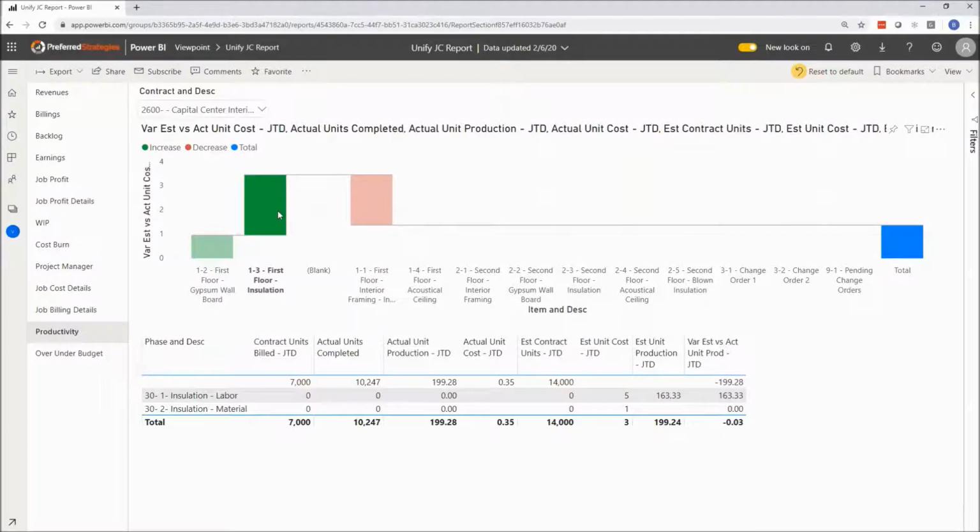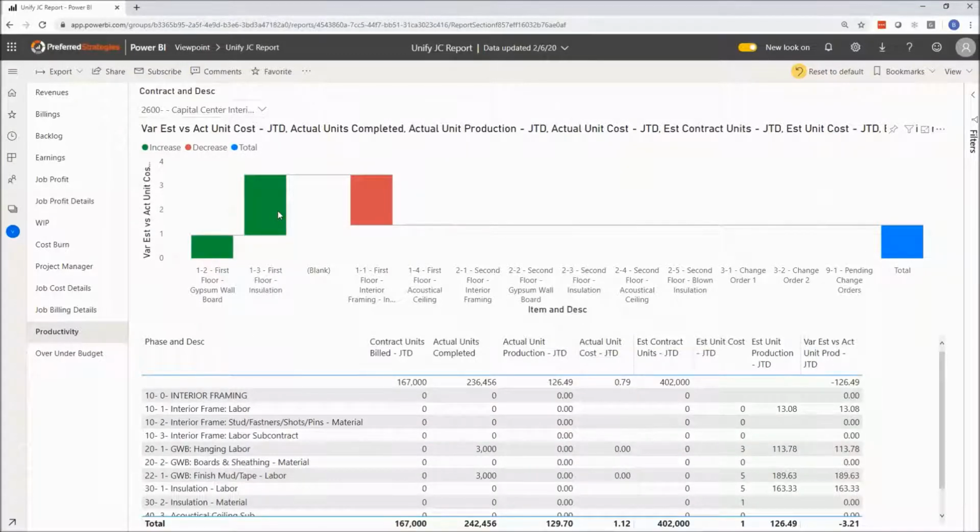values. I built one of these charts one time for a high-rise construction company that wanted to understand their production by floor, right? So they did the same steps as they raised this building floor by floor, but they wanted to understand as you get to certain levels of height, the 50th floor, your cost is actually different just in terms of getting materials there than on the 20th floor.